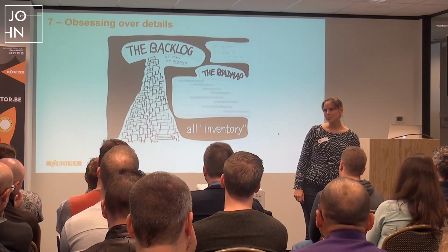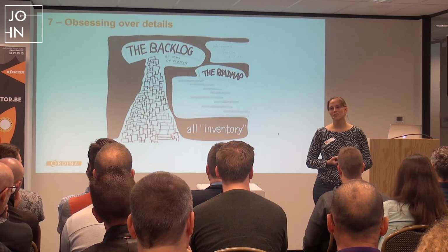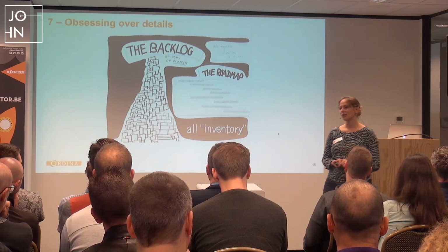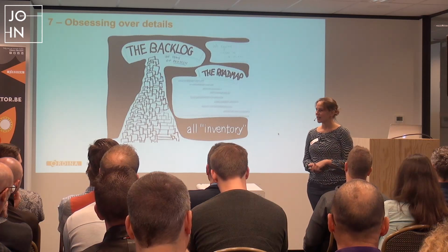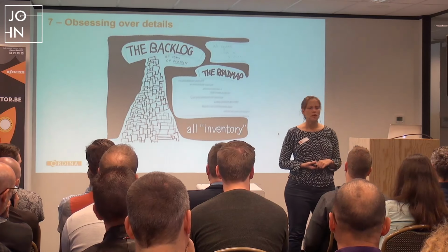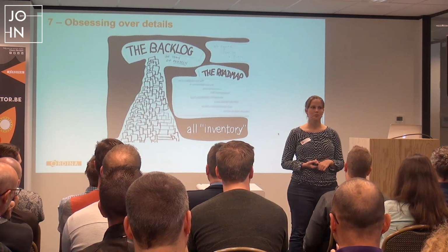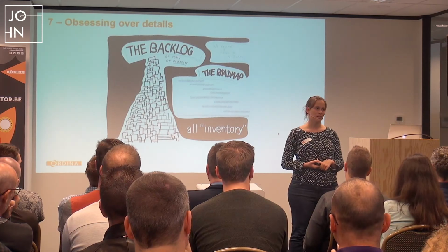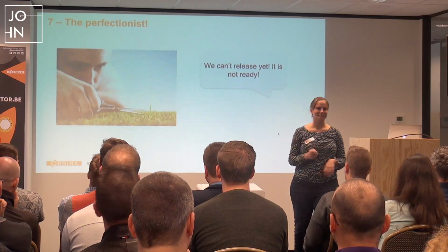And the only thing you actually write down in your Jira should be acceptance criteria pertaining to that user story. Because the rest is done in the conversation, the 3rd C. And the conversation should be face-to-face. I know it's not always possible, but please include your product owner in your refinements. If he's not available, we come to that later.